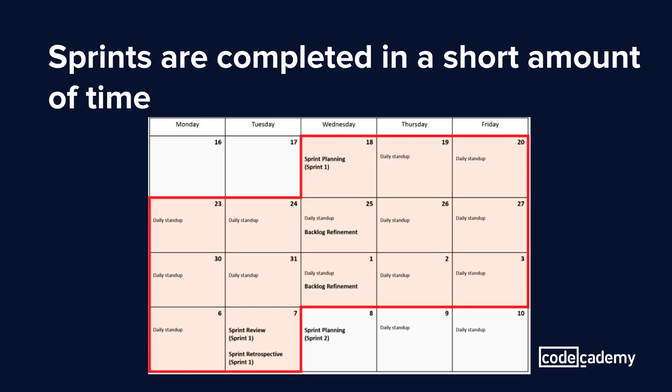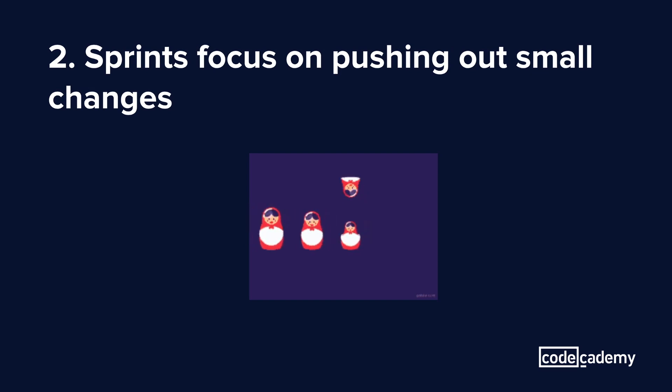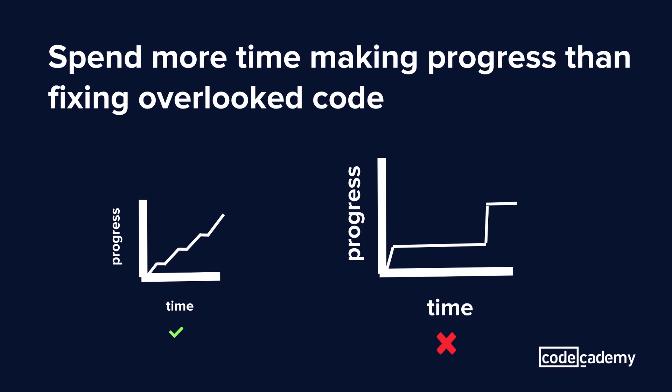Sprints can last anywhere between a week to a month. I've typically seen them occur within two weeks. By limiting the time frame, it forces the planners to stick to small iterative changes so that you don't have a lot of massive features or too many changes going out at once. This allows clients to get a more seamless experience as they're transitioning to newer versions of the product, and it also helps expedite releases.